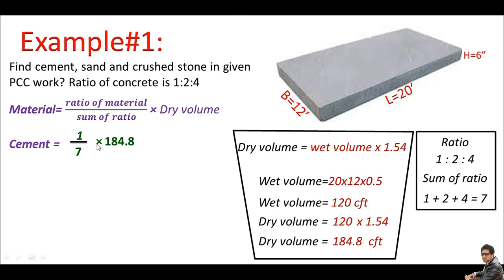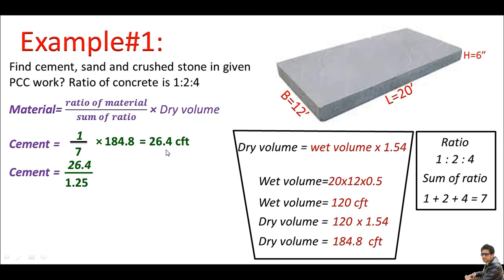Plugging this into the equation: Cement = (1/7) × 184.8 = 26.4 cft. The quantity of cement is always expressed in bags, so we convert by dividing by 1.25 cft (the volume of one cement bag in cft; in cubic meters it is 0.035 m³). So cement = 26.4 / 1.25 = 21 bags.